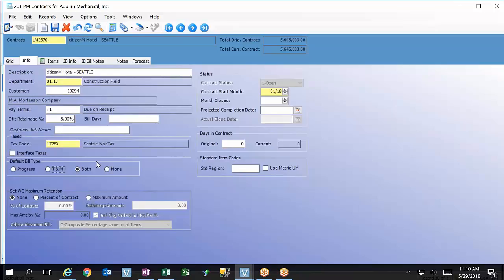Even if you received a contract where the tax was included, you'd want to back out the tax, and your original contract amount should be pre-tax, and then just add tax to it, because really your revenue is based on the base price of the contract.